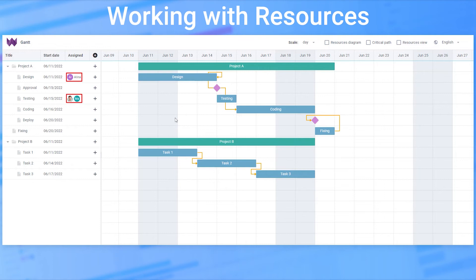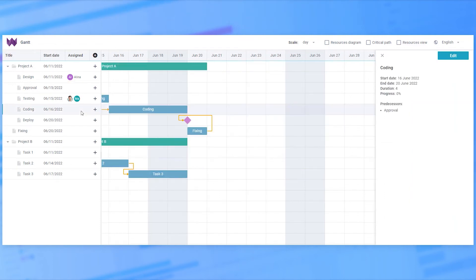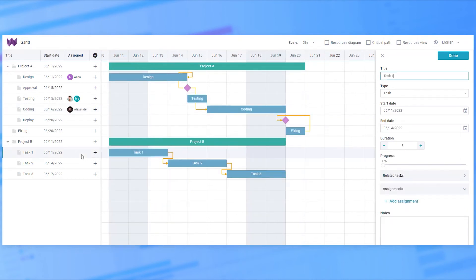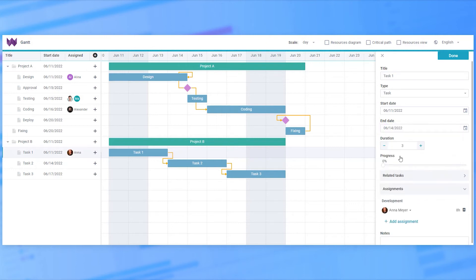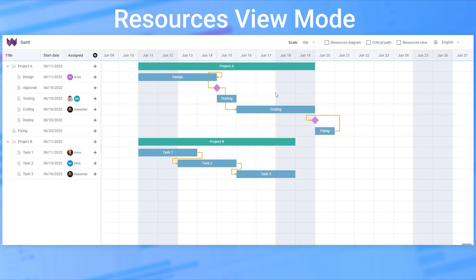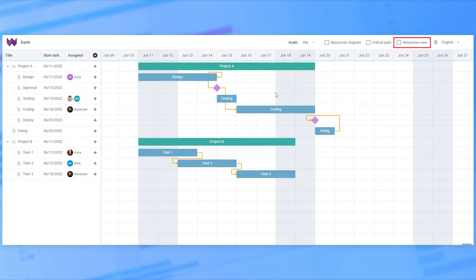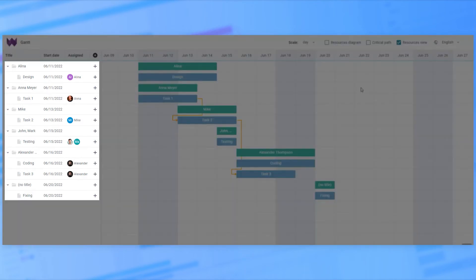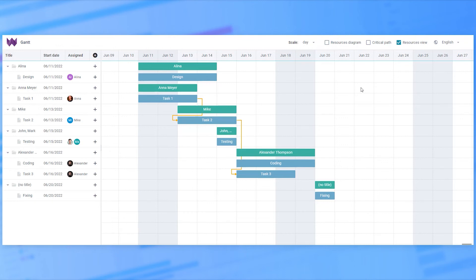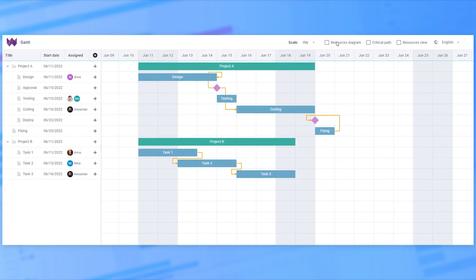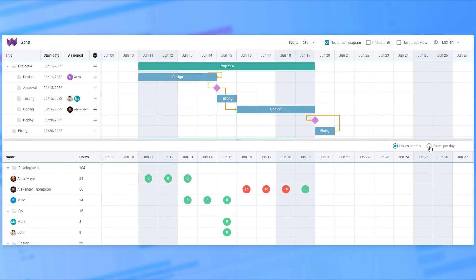One of the distinguished features of the Gantt chart is the ability to work with resources. You can efficiently manage resources by assigning them to certain project tasks. You will also be able to view resources in the tree and chart using a special mode, as well as analyze the workload of resources via a special diagram. By default, the widget displays only the tasks in the tree and chart, allowing you to view projects, tasks, sub-tasks, and milestones. But you can switch to the resource view mode as well. In this mode, the widget displays only the tasks grouped by the resources they are assigned to. There is also a separate unassigned section that contains all unassigned tasks. The resource diagram allows you to analyze the workload of each resource by hours and tasks. If the resource limit is exceeded, the widget will highlight it in red on the diagram.